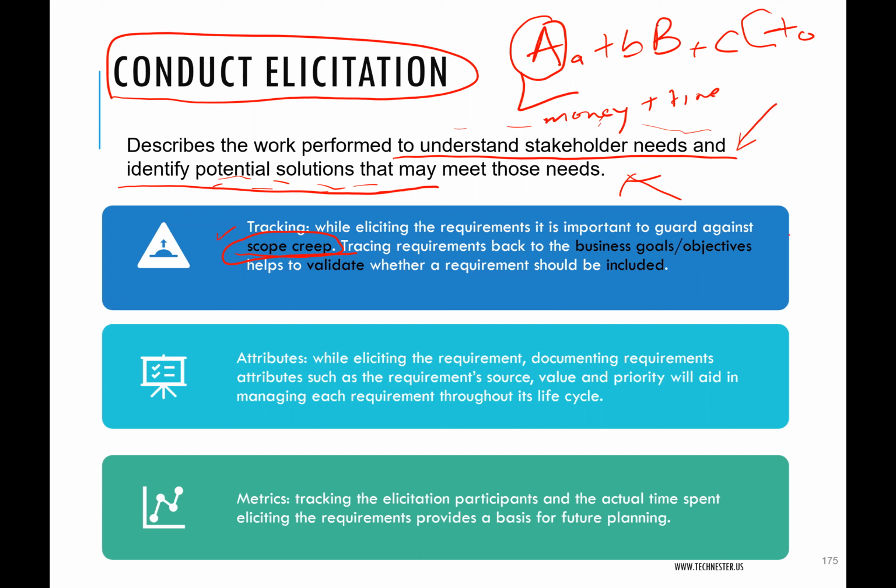Solution requirements, which would usually come from working with your developers and looking at stakeholder requirements, must also align with the stakeholder requirement. When you start having extra solution that does not have anything to do with what the stakeholder has requested, that is scope creep. Okay.